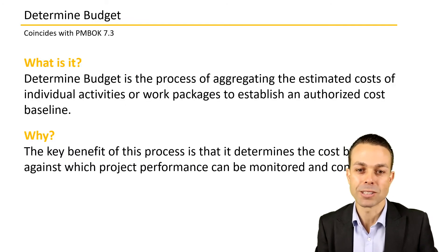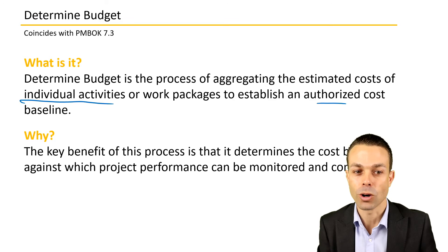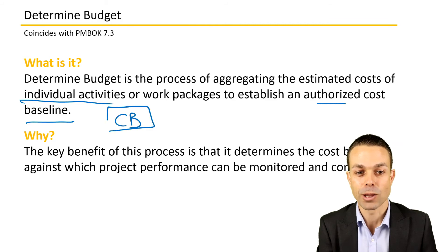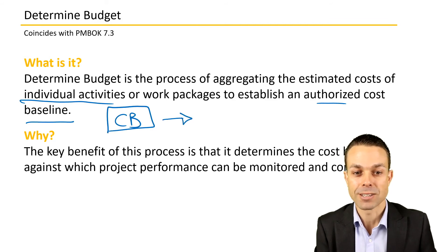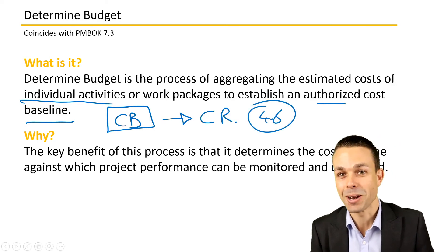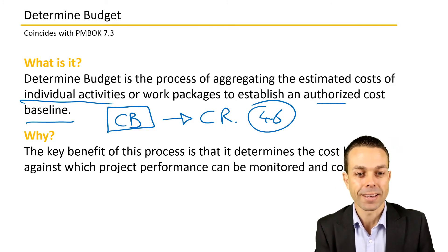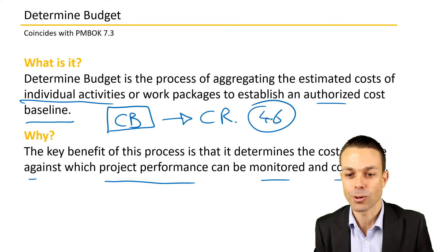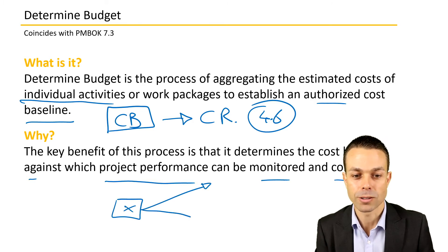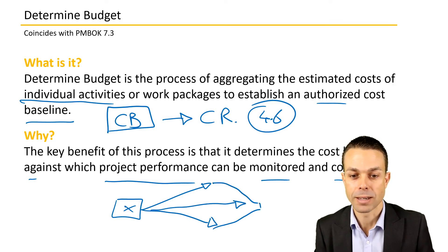Determining the budget is the process of aggregating the estimated costs of individual activities or work packages to establish an authorized cost baseline. This is where we're actually creating that cost baseline, and it's going to be locked in place at a certain point in time. If we need to change it in the future, we need to go through a change request via perform integrated change control. We do this because it determines the cost baseline against which project performance can be monitored and controlled.